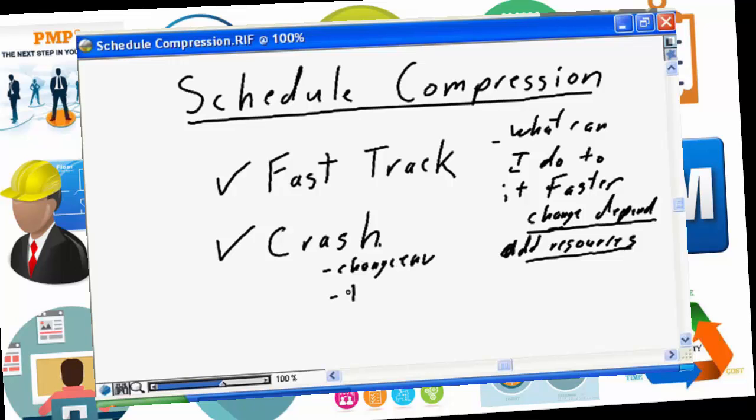Can I add more tools? If I add some productivity tools, if I change the environment within which my team is working, can they do things faster? Adding tools may in fact be a great way to crash the project. But what is the learning curve for the tools? The second I implement the tools into my project, will I in fact get schedule compression, or will there be a learning curve? Will my team get over the learning curve fast enough to achieve the benefits for the tools?